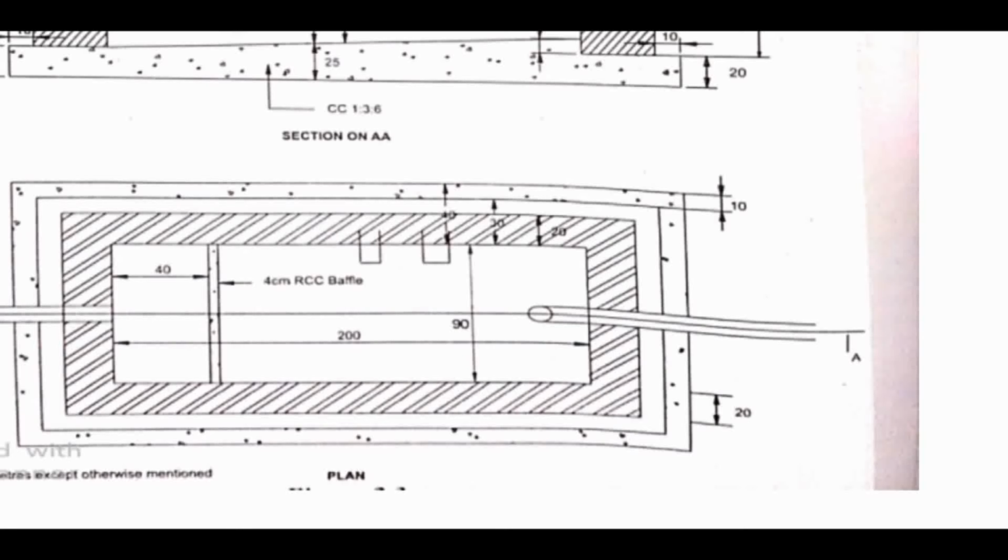When you are going to consider the short wall, only the inside to inside length you have to consider, right? Because if you take the outside to outside, then the long wall and short wall will get merged in the corners. So only the inside to inside dimension we have to take. What is the inside to inside dimension?